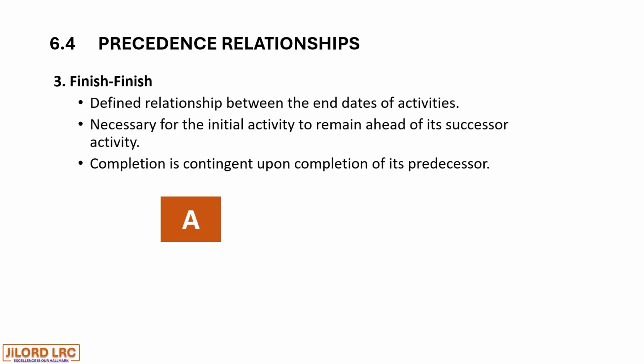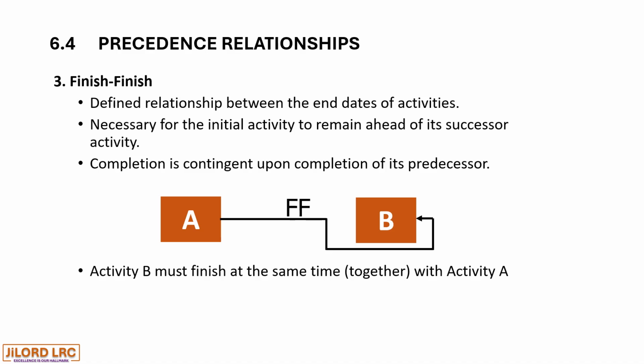So in this case, we consider activity A and activity B. The finish of activity A leads to the finish of activity B, and this is a finish to finish activity. Activity B must finish at the same time together with activity A.